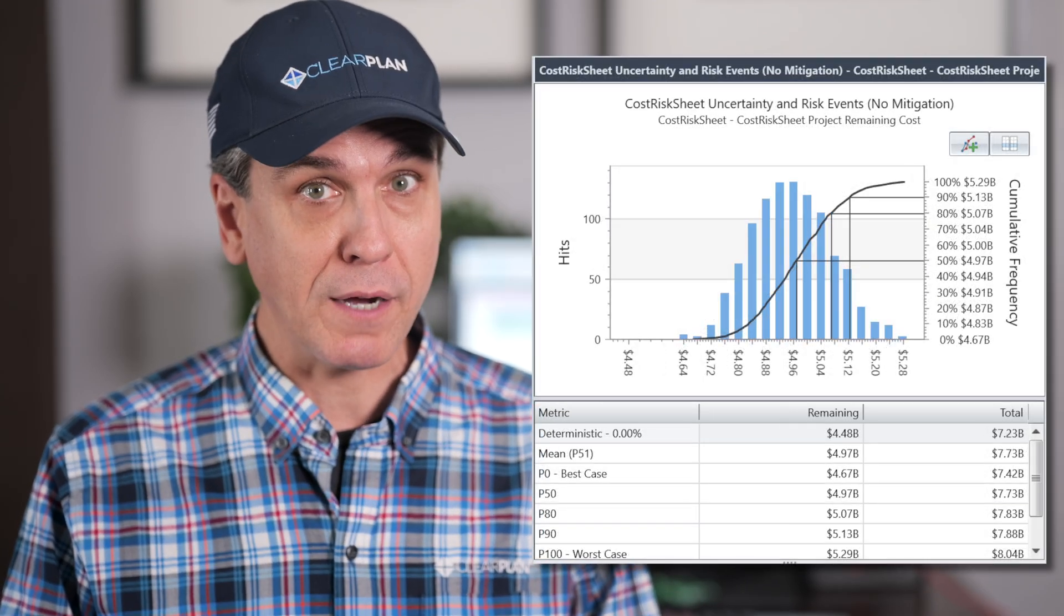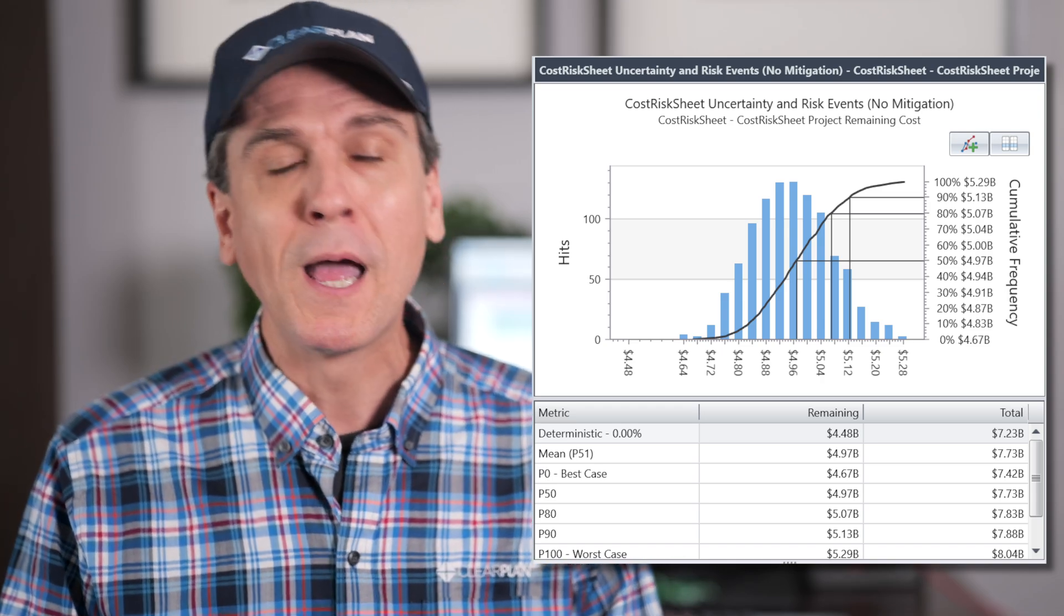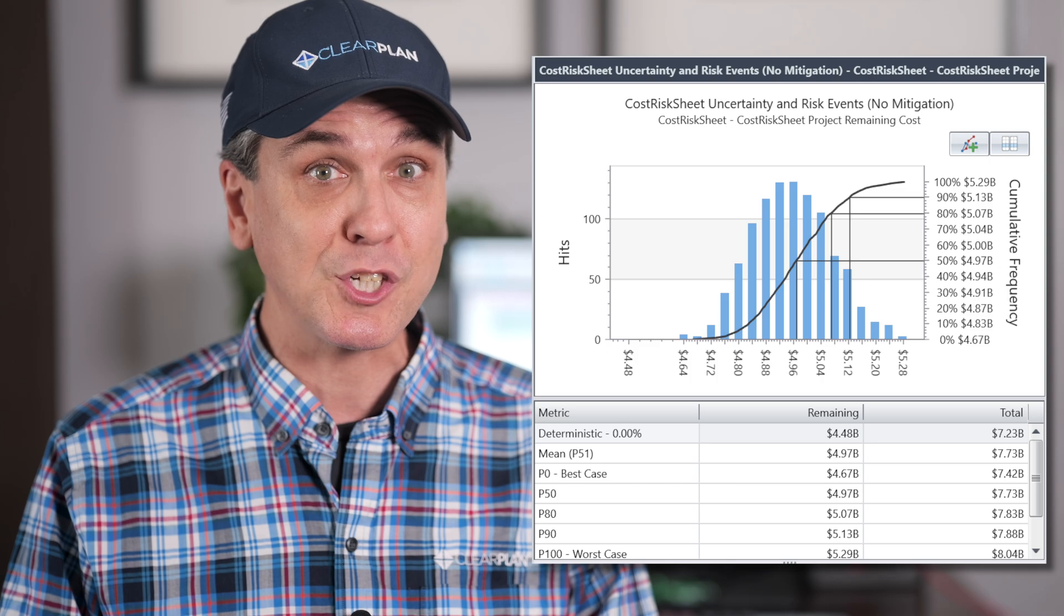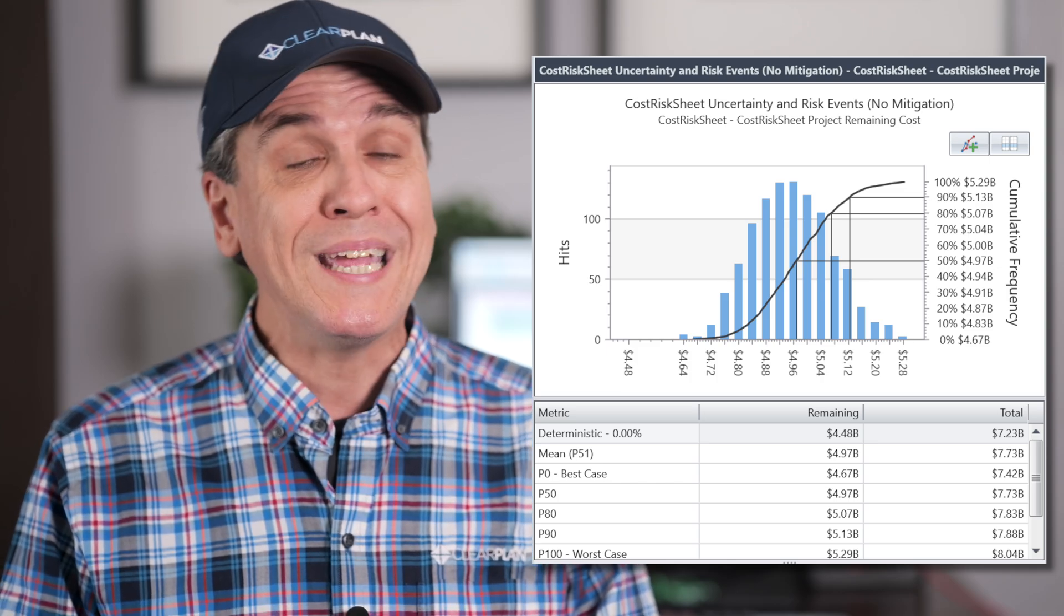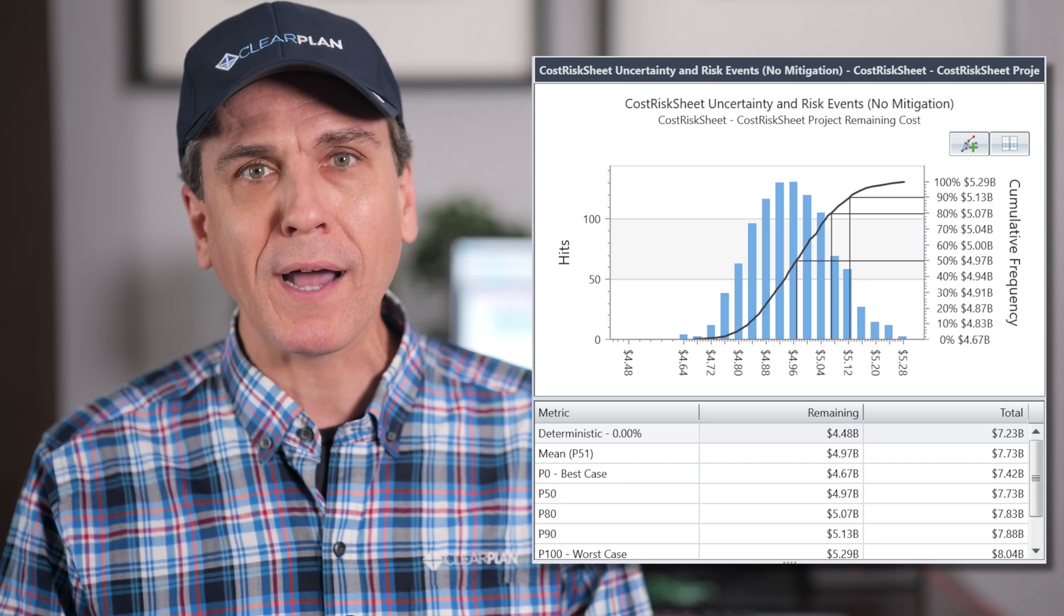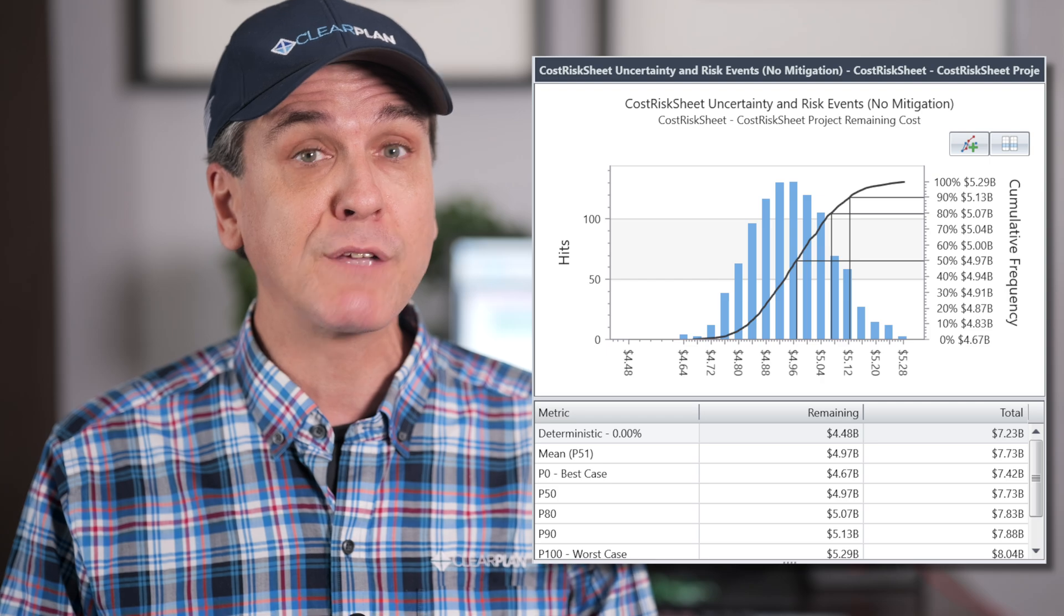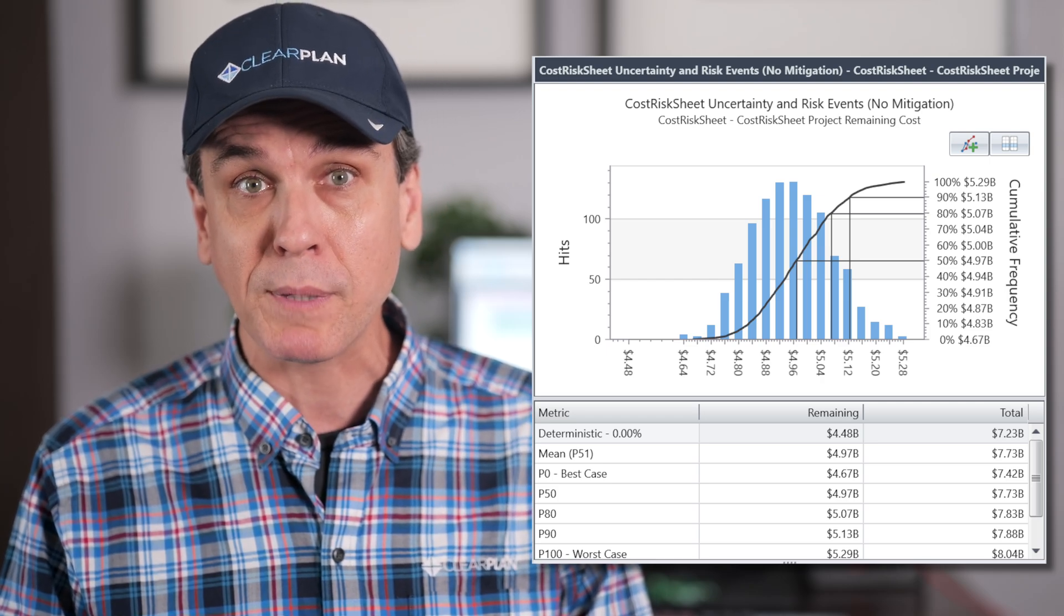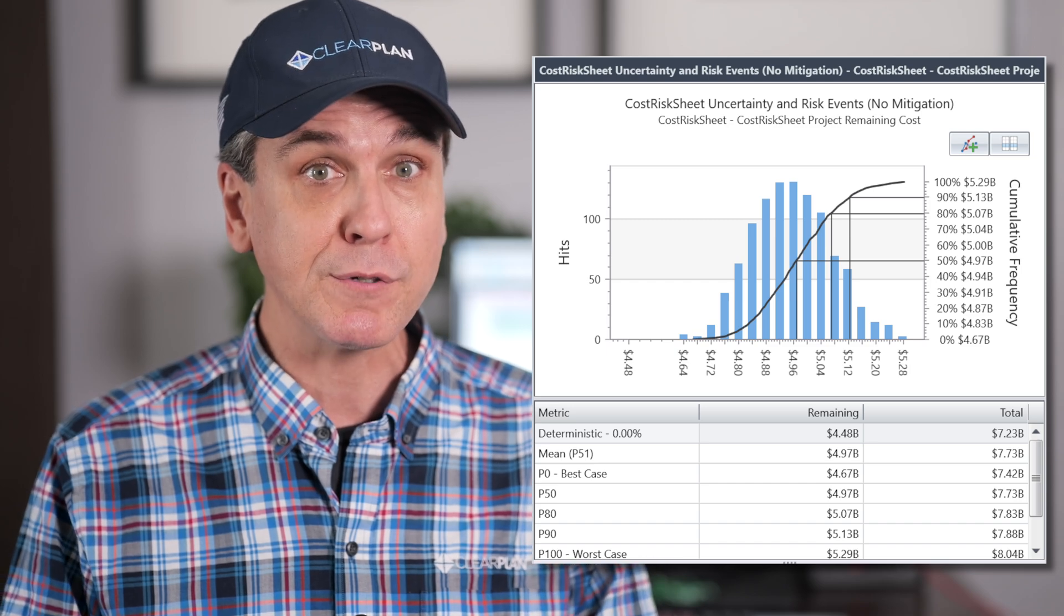Let's talk about cost now. The chart looks strikingly similar, but with currency values instead of dates in the chart and in the table beneath. Your P80 value will be a dollar amount, and the same rules apply. Look at the range of outcomes and assess the validity of your deterministic cost estimate by taking a look at the various p-values.